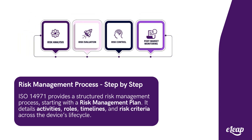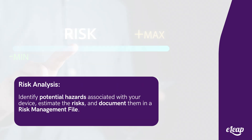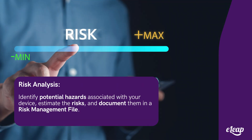ISO 14971 outlines a structured process for managing risk, starting with the risk management plan. This document specifies all the risk management activities needed throughout the device's lifecycle, including roles and responsibilities, timelines, and risk acceptability criteria. Let's explore the key stages of this process.